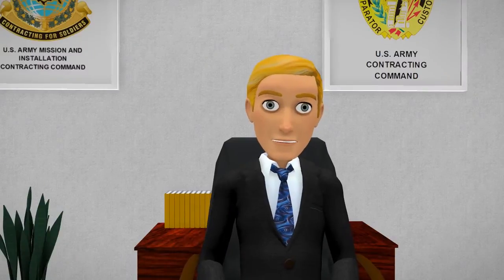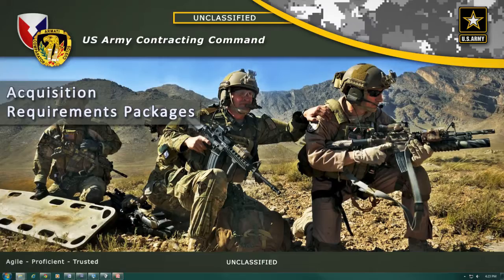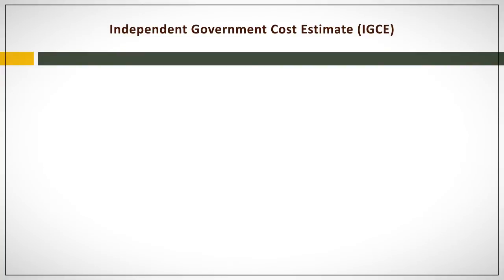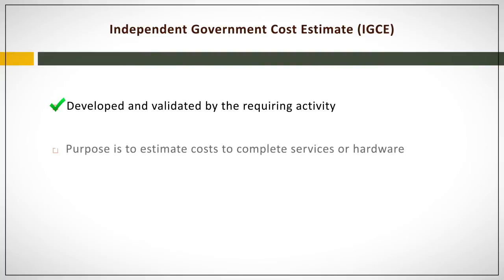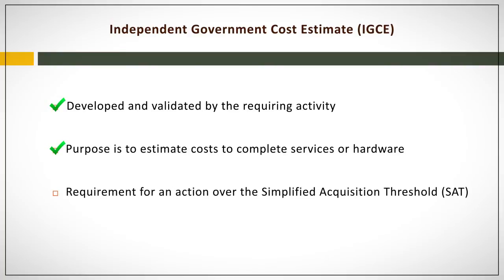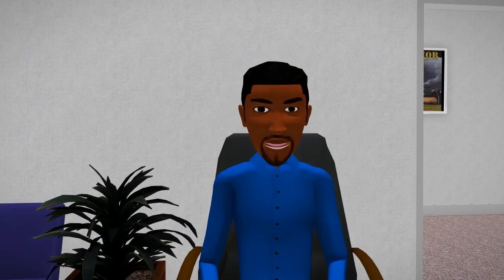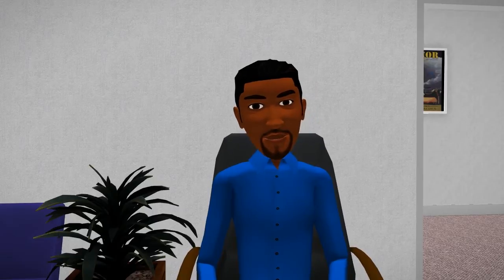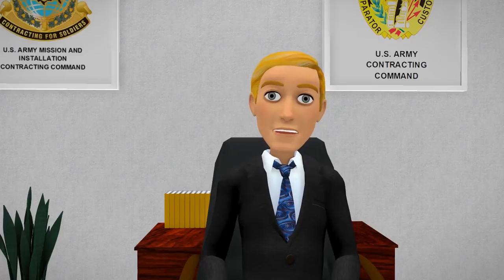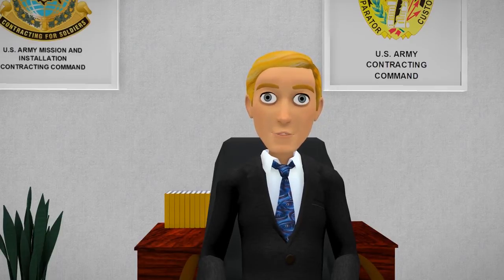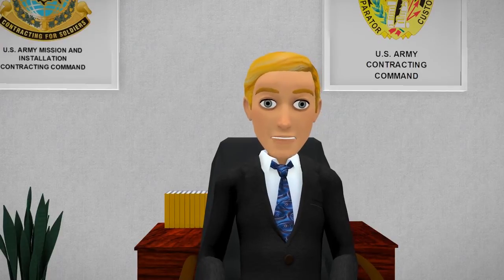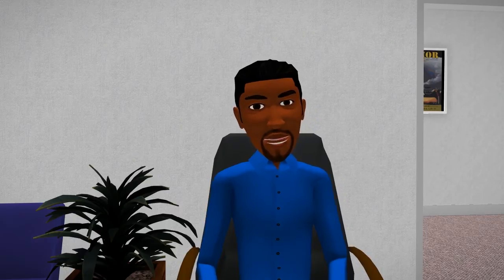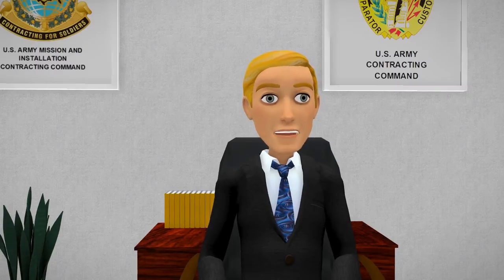Of course, I'll go over the IGCE with you. To begin, let's talk about exactly what the IGCE is. The IGCE is the government's independent government cost estimate developed by the requiring activity, and its purpose is to estimate what it would cost to complete the tasks required or to purchase an item. An IGCE is required for any action over the simplified acquisition threshold. The simplified acquisition threshold means a specific dollar value which is set and defined within FAR 2.101, along with the applicable exceptions. I will make sure to research this when I get back to my desk.